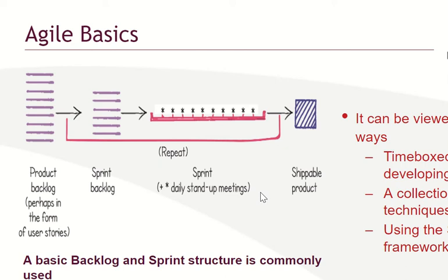First day, we would get people to begin to dig. They will dig for 2 days. Third day to fourth day, we would get cement. These days will get this. So that is the sprint backlog, the activities you want to do. And you begin to carry out the activity.